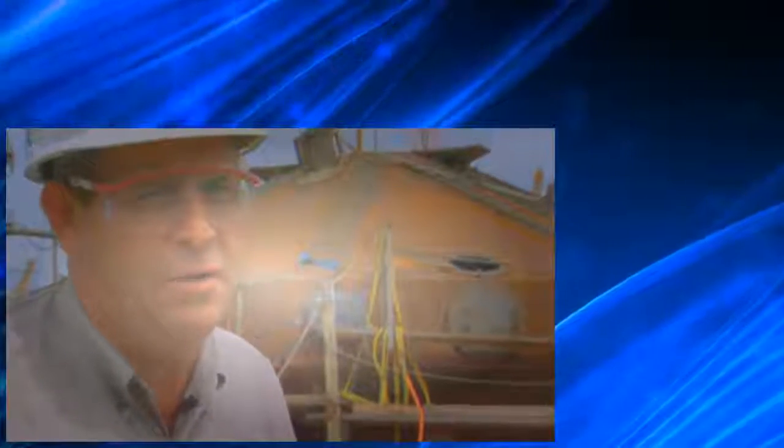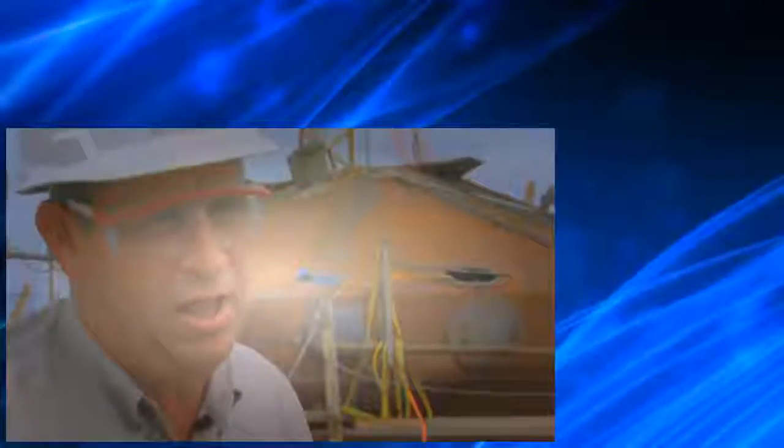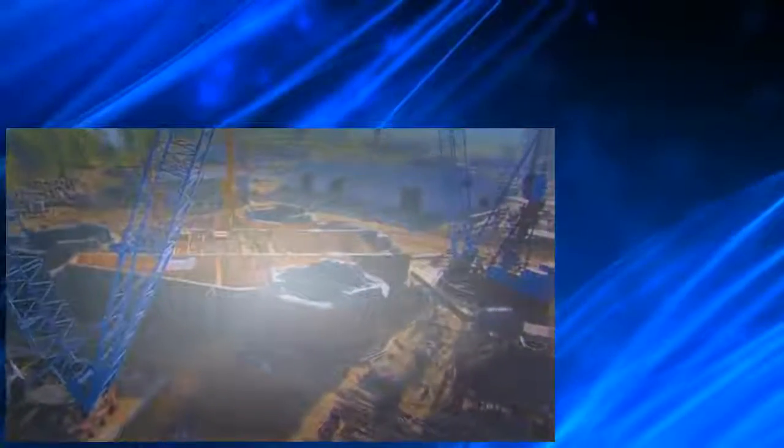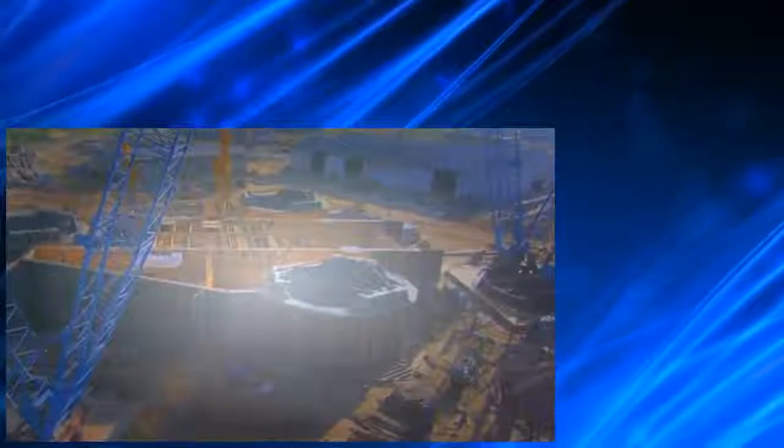After 3 long years, the shipyard came back with a sharp new focus on the bottom line. But then, on the first Tarzan rig, we were running way behind schedule and we had to work a lot of extra overtime and brought in a lot of contract labor to try to compensate meeting the time schedule. So Bodie needs to cut millions of dollars off this rig's bottom line.